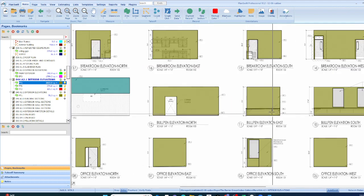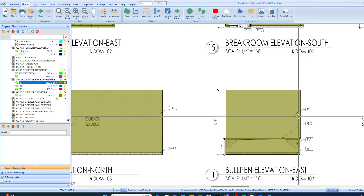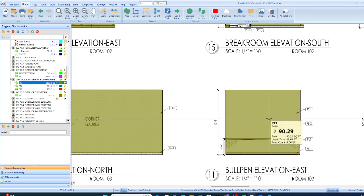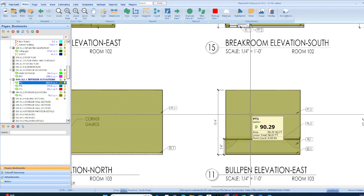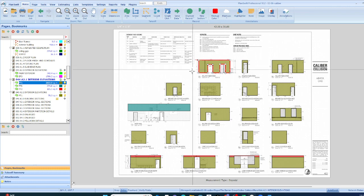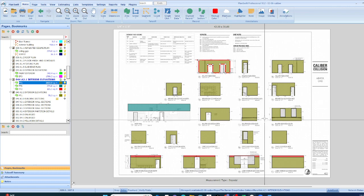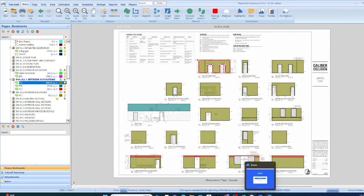Look in the finishes, paint's a finish. And so you look in the finishes under paint, and it will exactly tell you everything that's going to be painted in the project. You don't have to guess. And then you can go to that page, make your measurements.